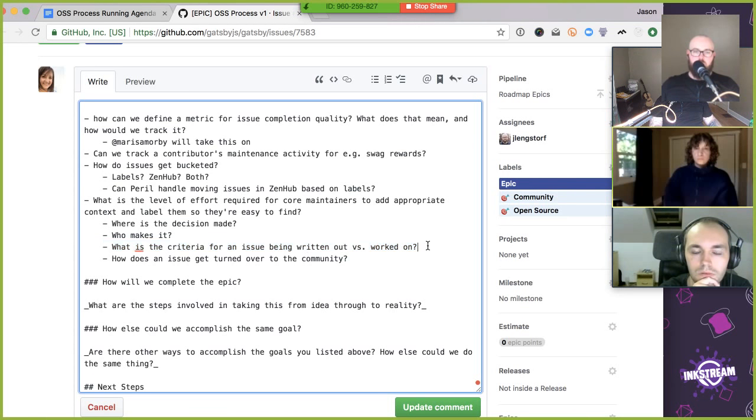And so this could maybe be done. Somebody actually just commented in Twitch that it could be done as part of issue grooming. So as you do your open source issue grooming meetings, you could decide which ones are going to be prioritized for internal work versus ones that would be turned over to the community. And I think that's a good way.